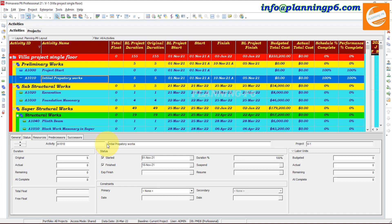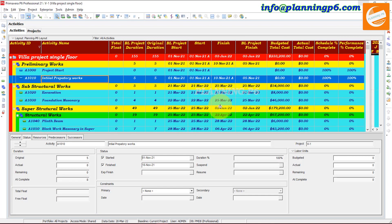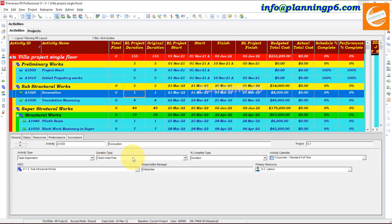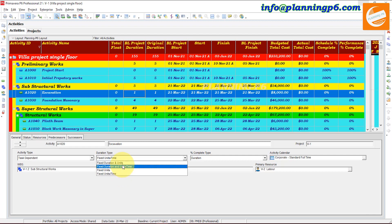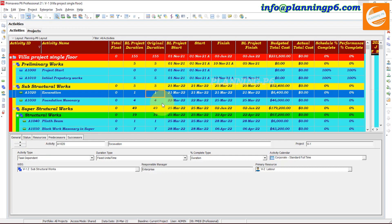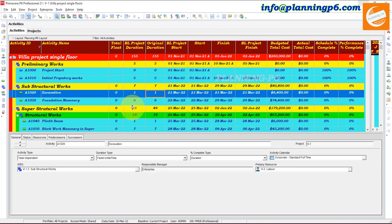Now we will produce according to 20th of July 2022, and we will increase some duration. For example, this activity — go to Status, General, Task Dependent, Fixed Units and Time. Here you have to fix units per time to not increase or reduce the units. If you don't want to increase the cost, we will increase the duration here — suppose two days — and here we can do it by six days.